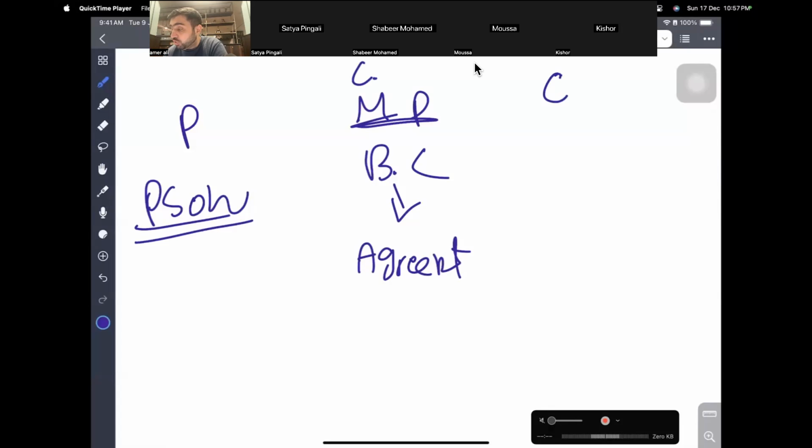Then we have control procurement in monitoring and control. Here, if you want to audit the seller, it must be written in your agreement. Please understand, audit is checking the effectiveness of the process. If you want to check it, it must be written in your contract. When the deliverable is there, you inspect the deliverable. When you inspect the deliverable, if you accept it, you can close the procurement and pay them. End of story. But if you disagree, a conflict is there.